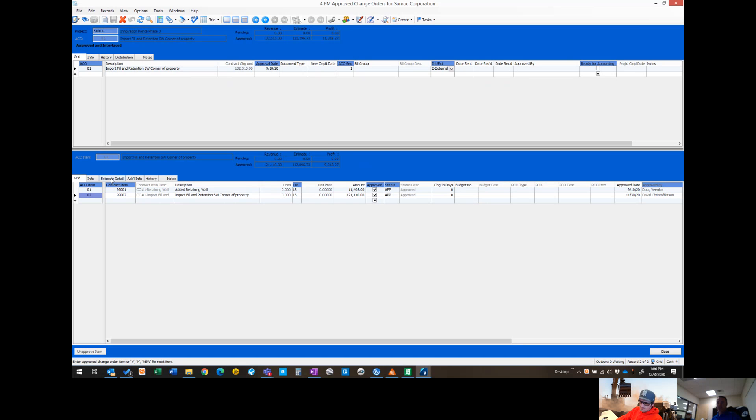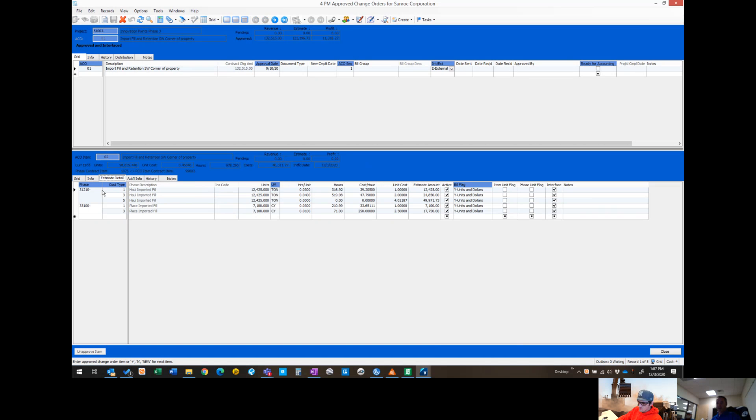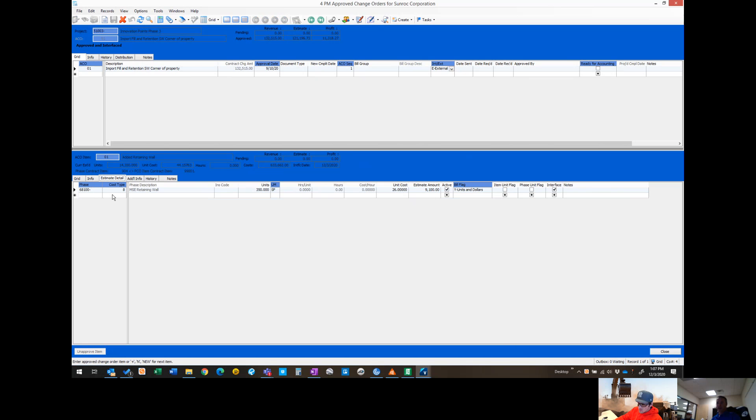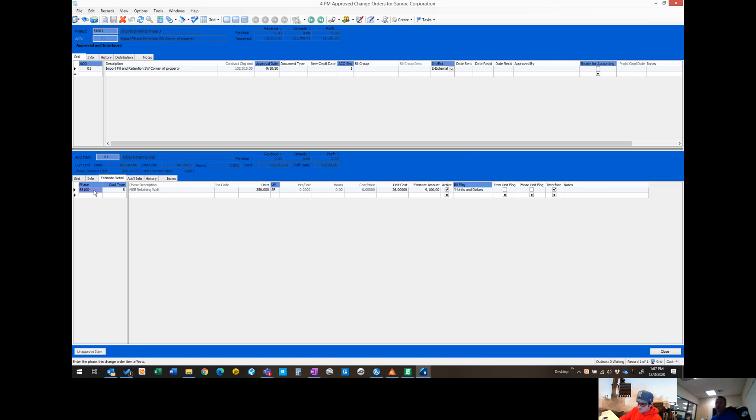He's gone into the estimate detail and added the phase codes for hauling and purchasing the fill with the associated costs. On the added retaining wall, this is the one that's all subcontracted. He's come in and put the added square footage, their unit cost with their total amount. He's actually interfaced this change order so it's in the system. Anytime on a change order that you have a cost type 8 associated with it, it will automatically take this phase code and cost type and set it up in the PM subcontract detail.